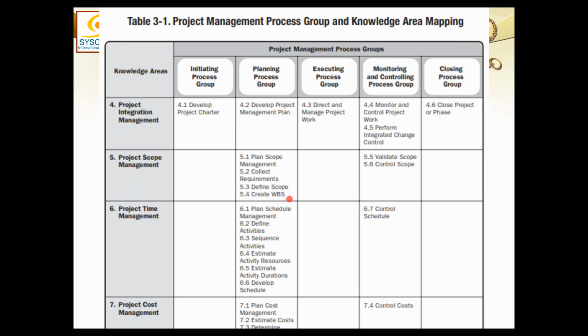So you present this plan in front of your boss, your sponsor, and tell him this is what I think is the final version which we should implement, and you should approve it. When the sponsor approves a detailed plan, that means he has baselined the plan.